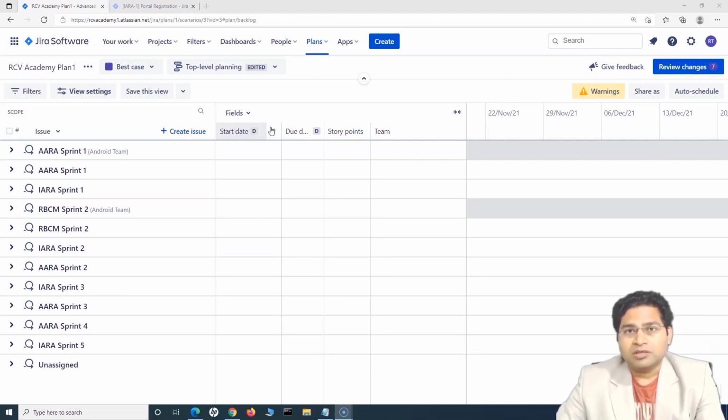Now, usually the teams in projects follow this: say you have 5 team members and there are no public holidays, no planned leaves. So in a 2-week sprint, you have 10 working days, right? Out of those 10 working days, teams usually assign 8 story points or 8 days of work for each of those members. So for a team of 5 members, usually 40 story points or 40 working days for the whole team will be allocated as the team capacity. This is what the team has in their hand within that particular sprint. So that's the capacity. All right.